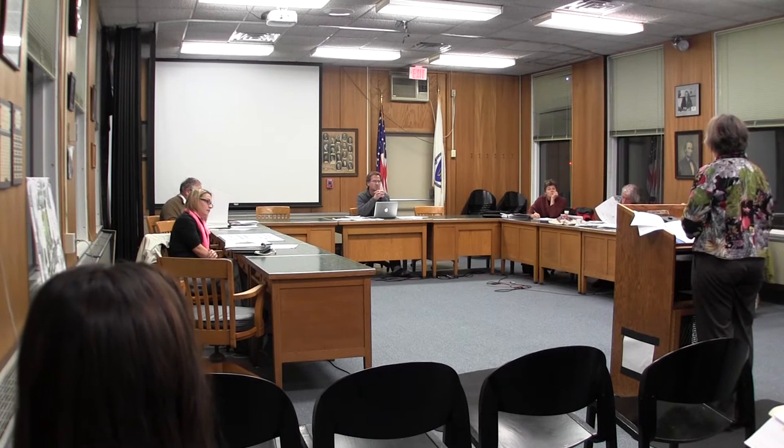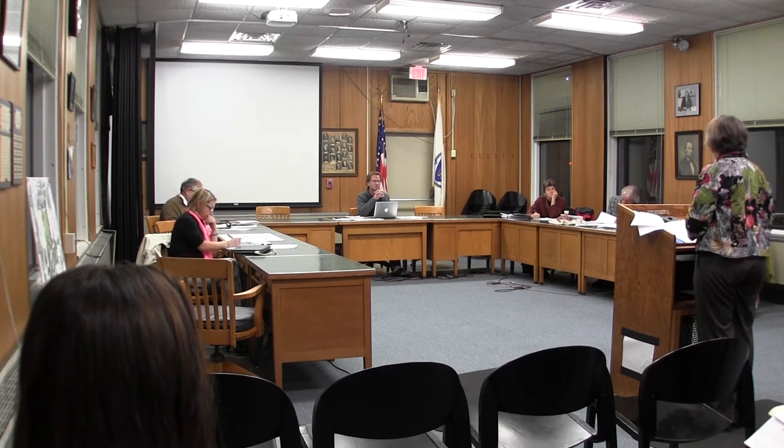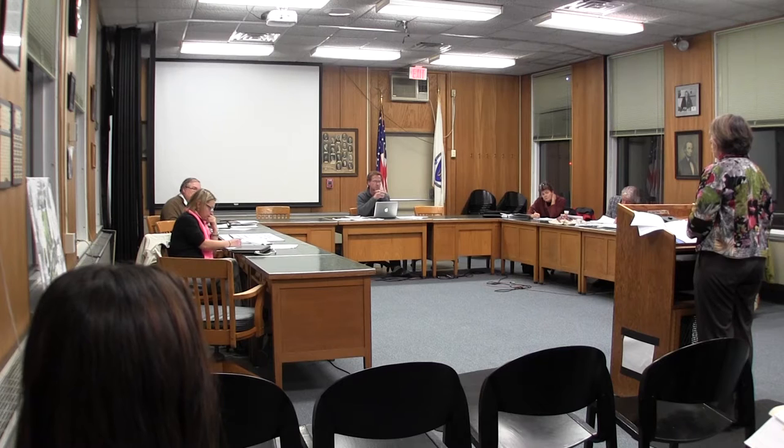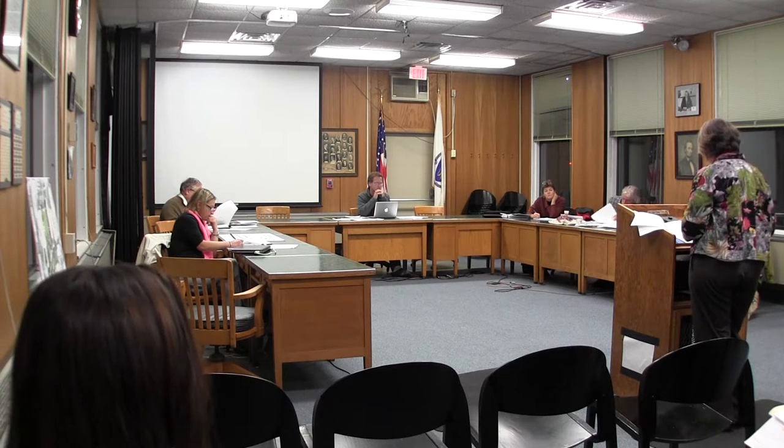We've also spoken with DHCD, Department of Housing and Community Development staff, who are also very interested in downtown redevelopment of an existing site. As I mentioned in the application, we already have pre-development funding approved for the development, as well as acquisition financing when we're ready to purchase the property. We expect to go before the planning board at the December meeting. When we receive site plan approval, we would be purchasing the property from Gail LaBarge, the current owner, and we would be holding that property until we accumulate all the funding and other approvals we might need in order to move forward with the project.